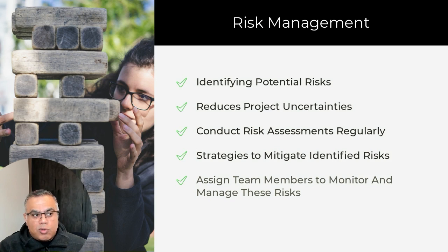How do you review those risks? Do you do it on a team call? I would just go step-by-step. Identify the risk, use your team to understand the severity of the risk, what impact it will have. How are we going to mitigate it? Do we accept it? Do we pass it on to a third party? Or is it low risk, high risk? Whatever it may be, put it in some sort of category and then put a mitigation saying, how are we going to avoid the risk?